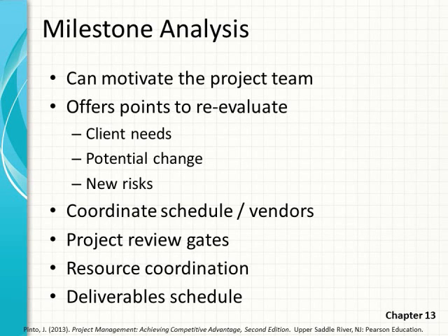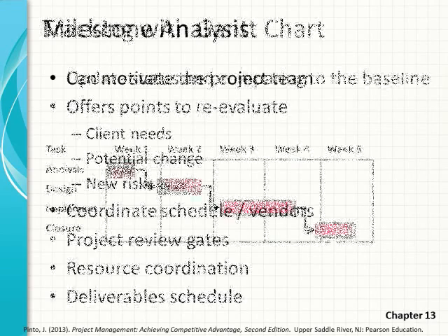We can use it as a motivator for the project team. It offers us points where we can reevaluate client needs, potential change, and certainly new risks. We can coordinate schedules and vendors. We can use these as project review gates. We can also use them to help us coordinate resources or create a delivery schedule.